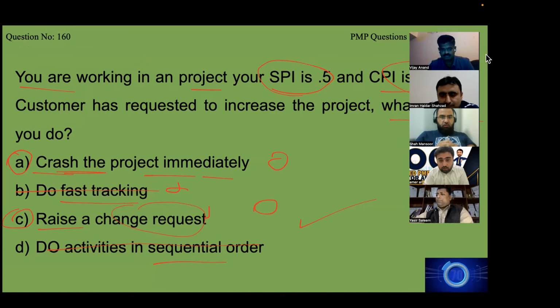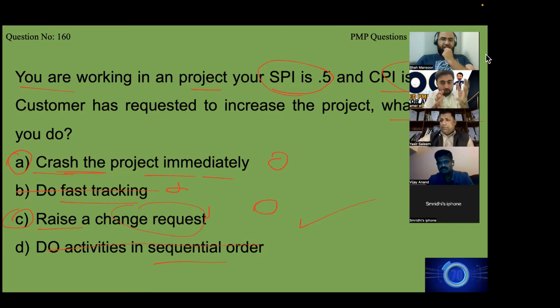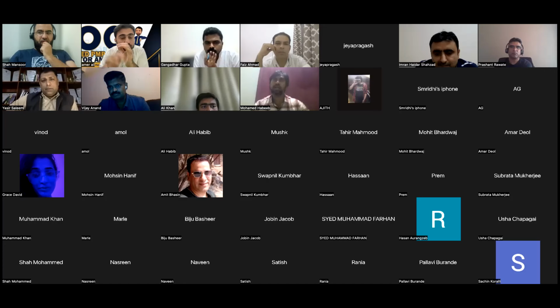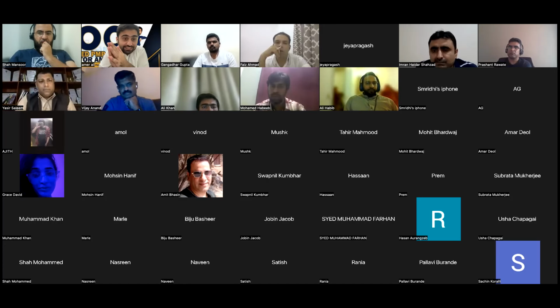Even the order or critical path, anything that you are changing, you need a change request for that. It will impact your baseline. It will change your cost baseline and schedule baseline. It can increase risk. And most importantly, first of all, thank you for asking this question. By crashing, it is possible that the risk increases.